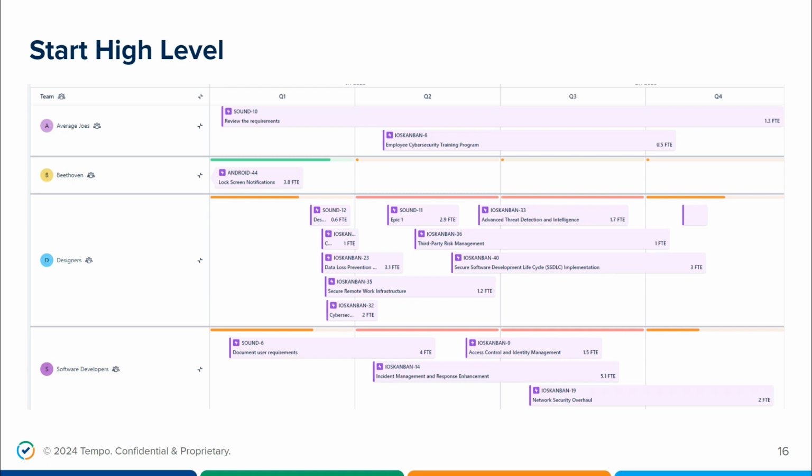Organizations will usually start planning at the team level. If you're familiar with Scaled Agile, the most simple way to describe it is you want to plan your work and iterate on it as you get into higher and higher levels of granularity. So you don't want to start out writing down every single detail of every single feature. Generally, organizations will start out with initiatives and maybe epics underneath them if they're Scaled Agile, or it could just be a series of tasks if they're not Scaled Agile. And then they'll do what's called t-shirt sizing, so a rough estimate of the work that's involved in an effort. And then that gets turned into a more specific amount of time as they get closer and closer to rolling out what the work involved is.